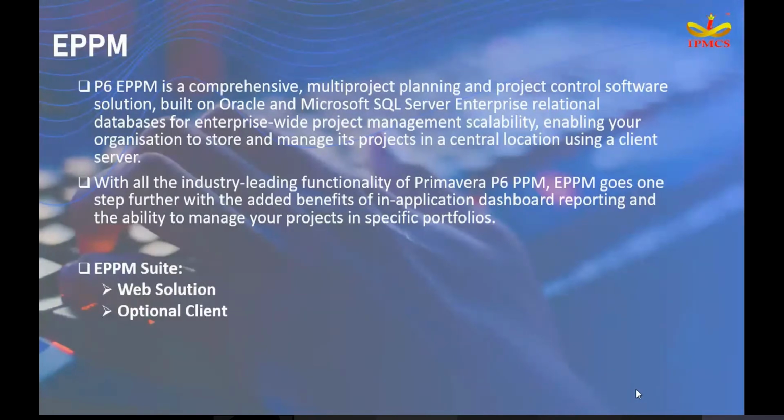In the EPPM suite, you have two different solutions. One is a web-based solution and another is an optional client, which is a desktop solution. Using the desktop, a planning engineer can work in offline mode also. Using the web solution, you can connect users from multiple geographic locations on the same project itself. One from India and another from another country can work on the same project at a time. Maybe people in India are doing planning and scheduling, and the site in another country can do the updates with a different login ID for the same project.